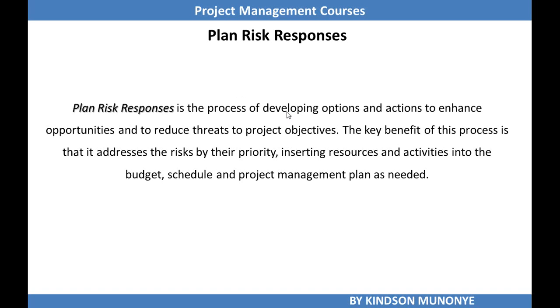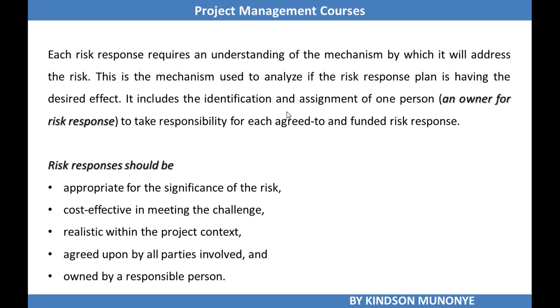Planned risk response is the process of developing options and actions to enhance opportunities and reduce threats to project objectives. The key benefit of the planned risk response process is that it addresses the risks by their priority, inserting resources and activities into the budget, schedule, and project management plan as needed. So note that each risk response requires an understanding of the mechanism by which it will address the risk. And this is the mechanism used to analyze whether the risk response plan is having the desired effect.